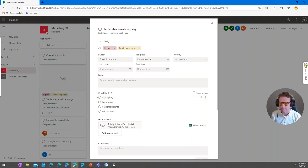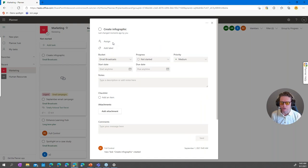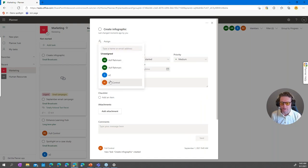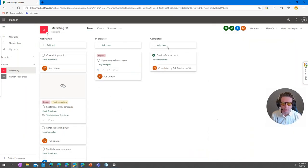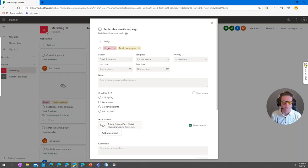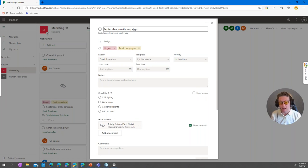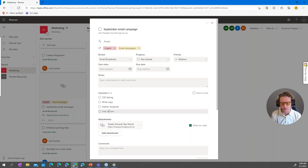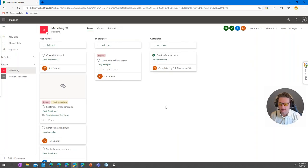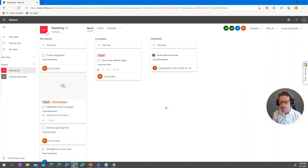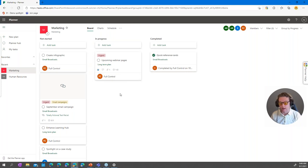When it's time to begin a checklist item, you can promote it to its own task using the arrow button — then assign it to someone. This makes it easy to brainstorm and create high-level goals or epics first, with checklist sub-items, and then promote and assign them as work begins. It's a nice shared format that's simple to track all the to-do items you're working on together.